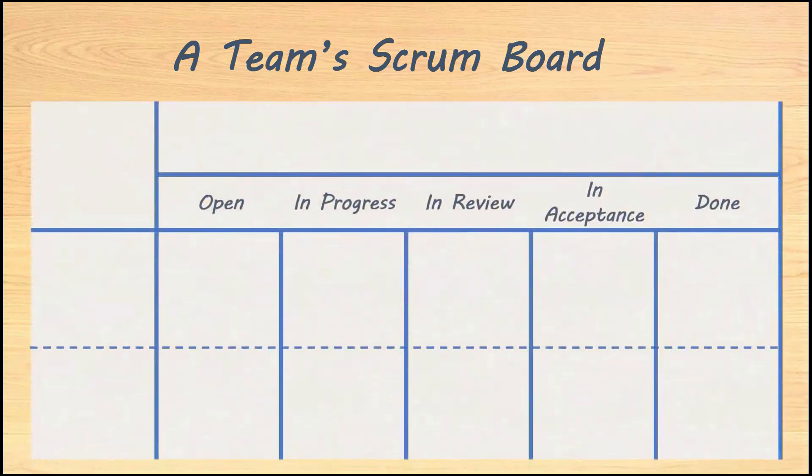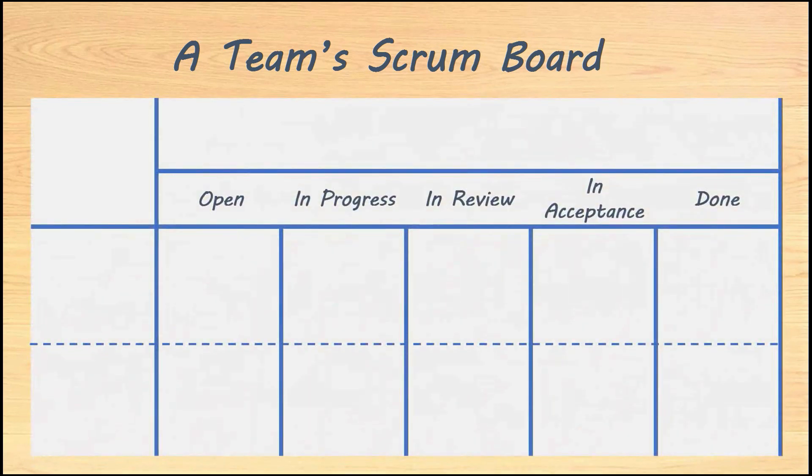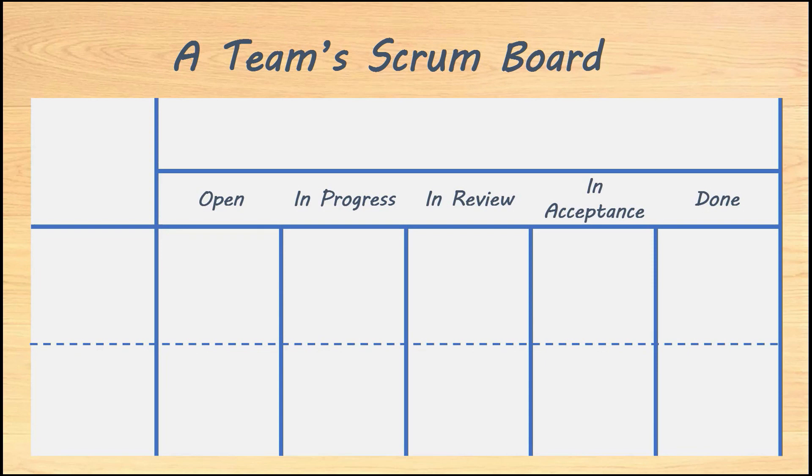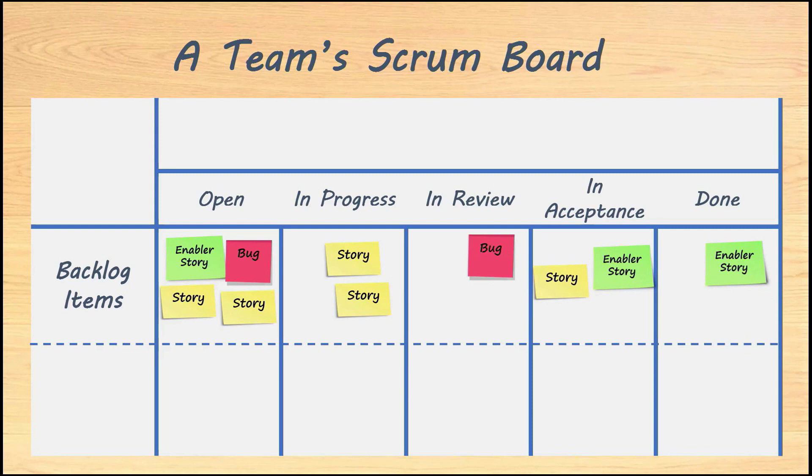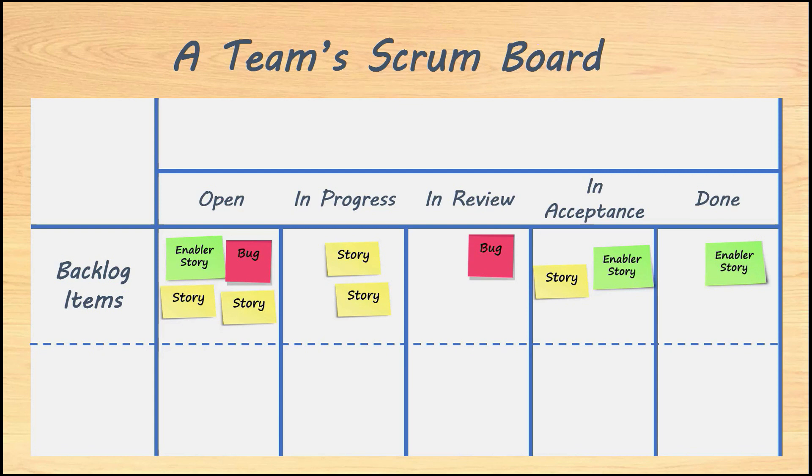In order to solve that problem, I introduced the concept of a double streamline, which I find particularly interesting, taking into account the functionalities that JIRA provides. So, in the board, you'll have two clearly limited streamlines. In the upper part of the board, there's a streamline that is focused on the life cycle of the backlog items, like the stories, enabler stories and bugs, making it easy to understand what's the current status of each. Apart from the team members, other stakeholders can also collect relevant information about how the items are actually evolving. Needless to say, this is only possible because all these backlog items have the same life cycle, allowing them to share the same streamline, as explained in my previous video about workflows.